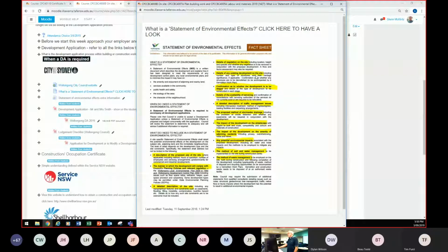Okay, by that it means if there's any trees, because with tree preservation, you can't just walk in and remove the trees to build your house, your swimming pool or anything else. You need to get permission to trim that tree and possibly remove it.